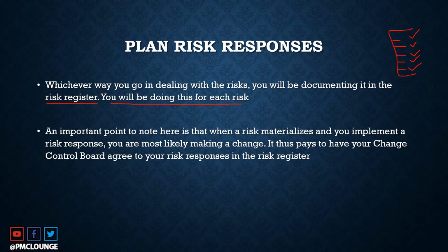Another important point to note here is, let's say this risk actually materialized and the response that you had planned was, if this risk materialized, you will add $200 to your project and will be able to mitigate the risk. So this is actually a change. You are adding $200 to your project.